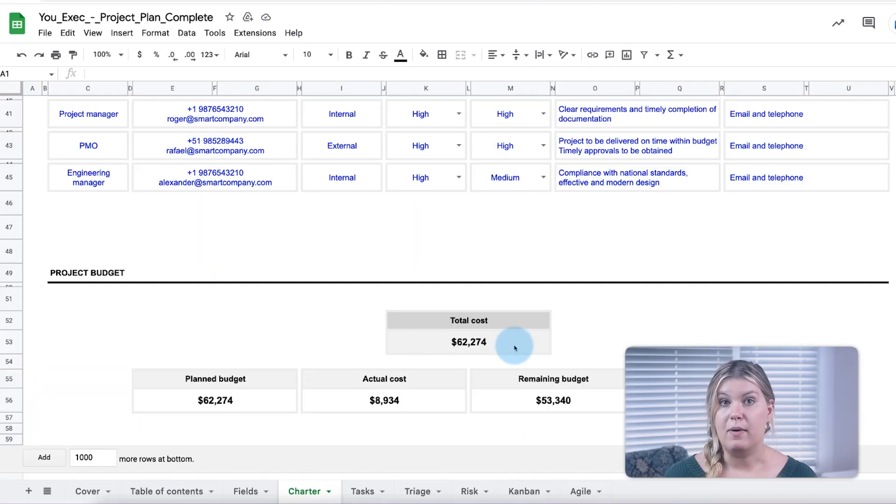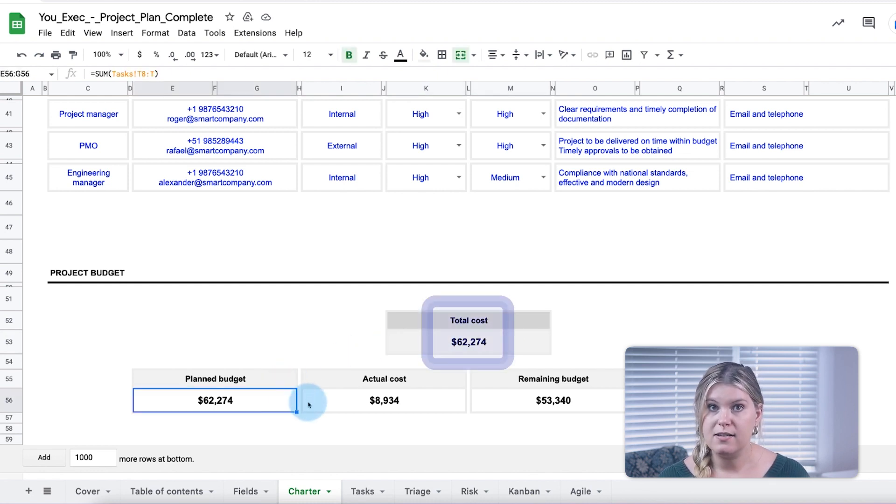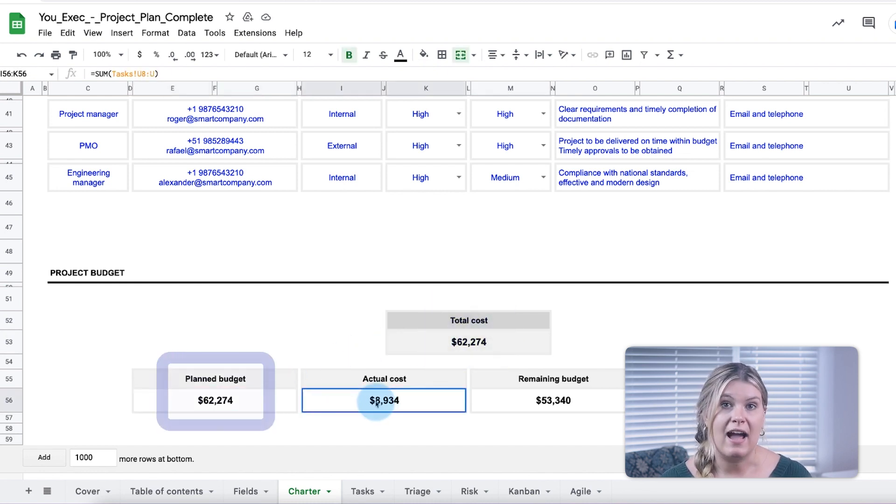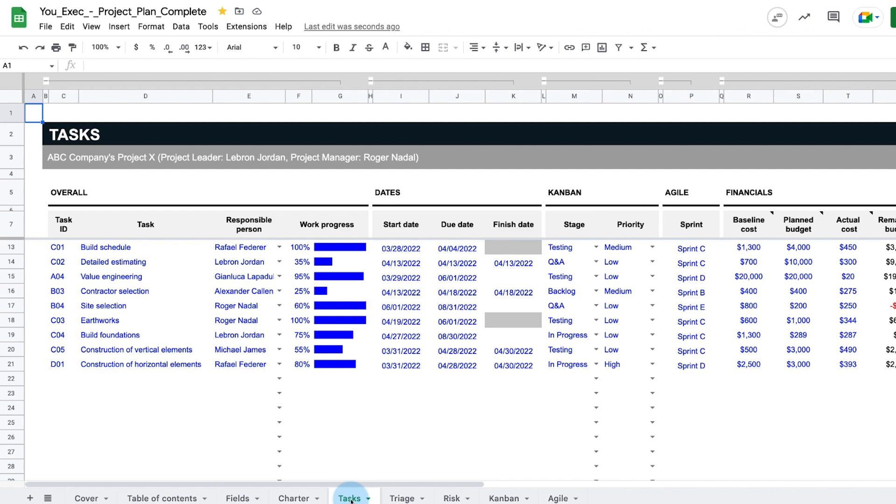At the bottom, the project budget calculations include the total cost, planned and actual cost, remaining budget, and percent used to date. These calculations get their data from the task list.